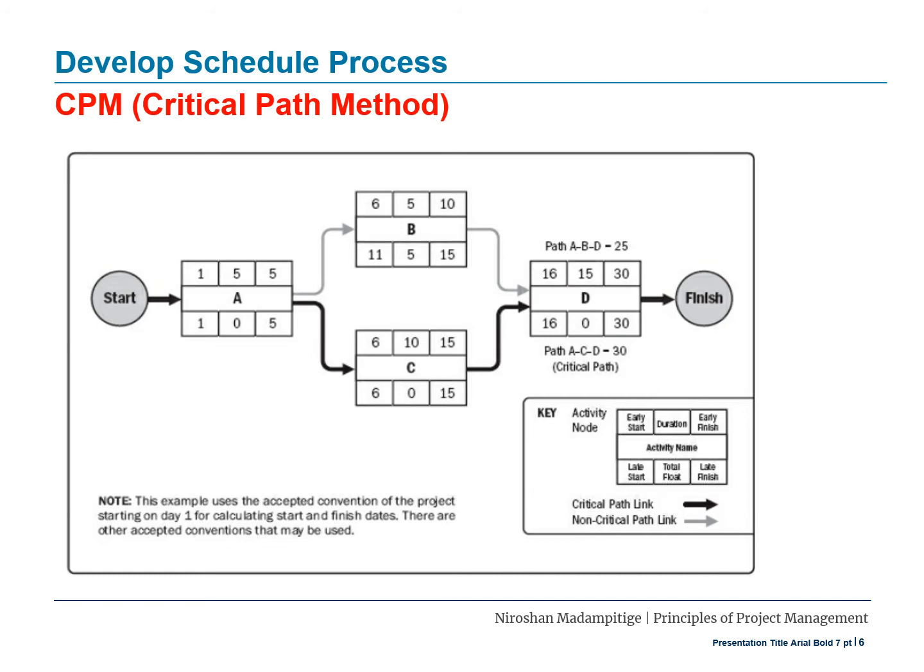As shown in this figure, the longest path includes activity A, C, D, and therefore the sequence of ACD is the critical path. The critical path is a sequence of activities that represents the longest path through a project which determines the shortest possible project duration.